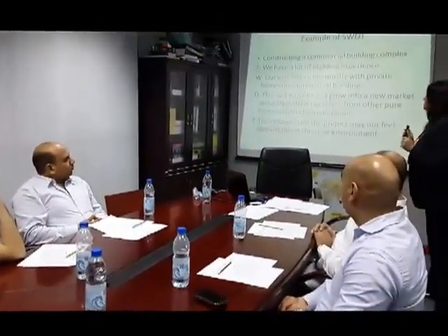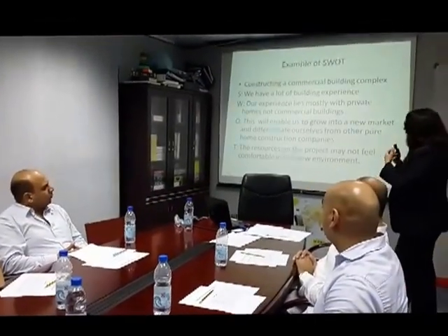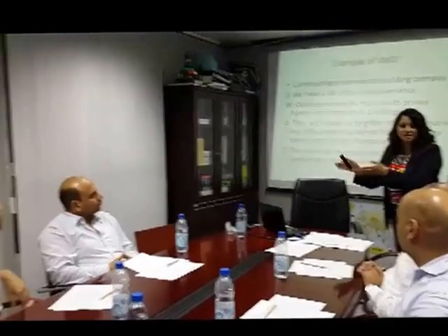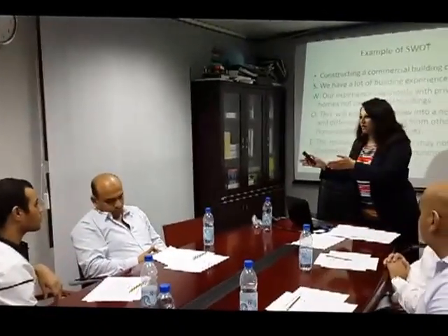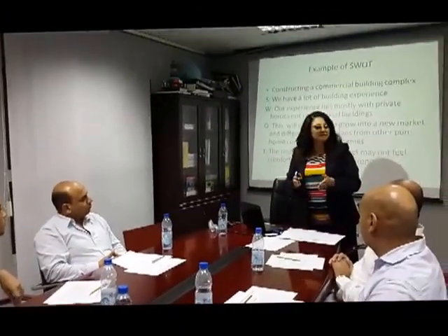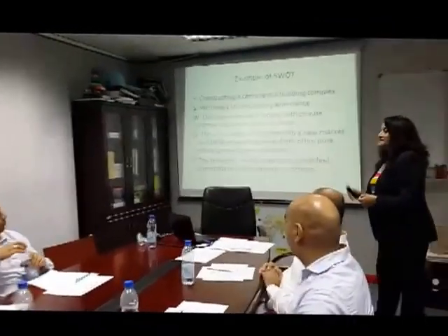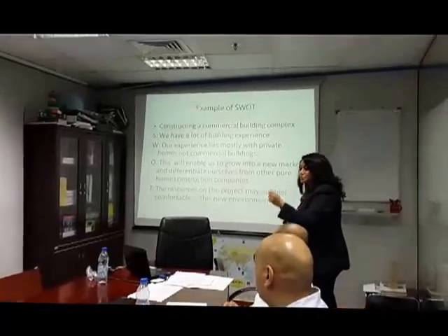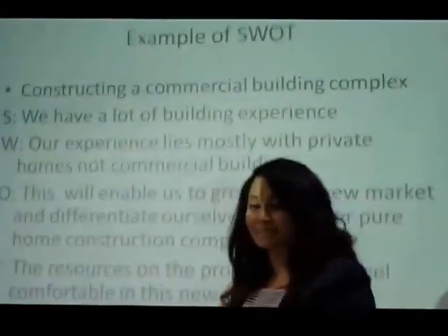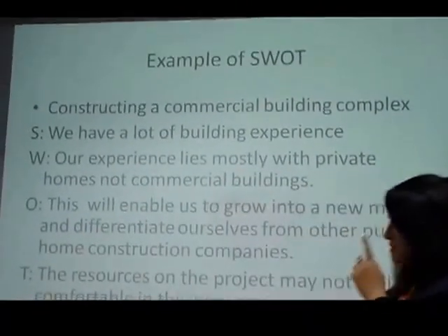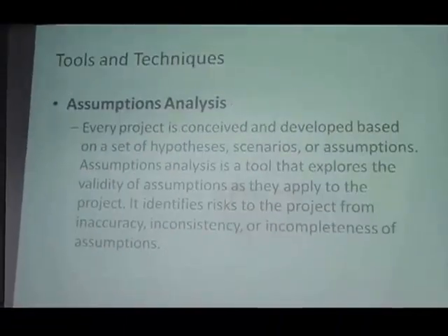Opportunity, what is this going to do to us? This is going to make us grow into the market, and it will differentiate us from other organizations that do the same business as us, which is building private homes. And what is the threat? The threat is the resources might not get acclimatized or might not like their new environment. Okay, so this is an example of SWOT.